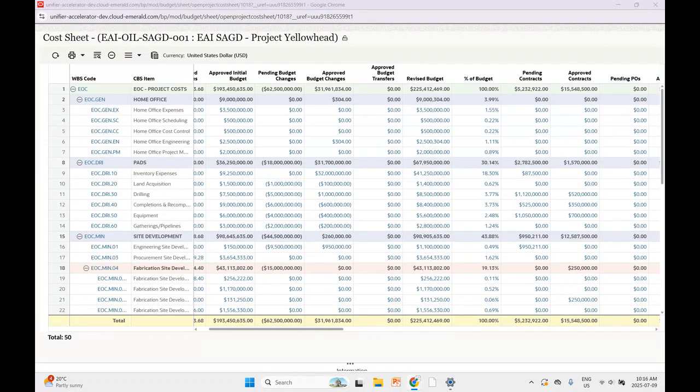That's an added bonus. We didn't have those things in contract management. We didn't have those automatic jam ups. I'm not allowed to issue a contract if I don't have the budget. Now, if you know that doesn't always work on your projects just by the nature of how you run it, you can also modify those. You don't have to have those turned on.